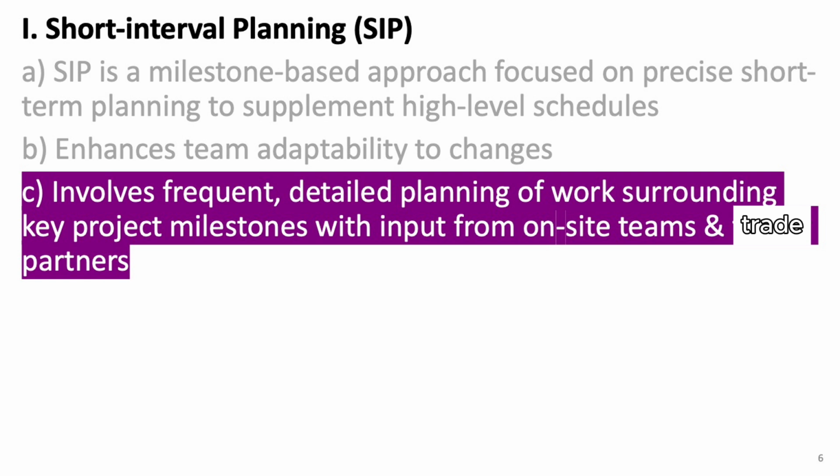Bottom line, SIP helps the team stay aligned on what needs to get done now, not just what's in the master schedule. It doesn't replace the critical path, it complements it. The schedules with critical paths give you the high-level plan. SIP keeps the day-to-day work on track and responsive to real-world conditions.